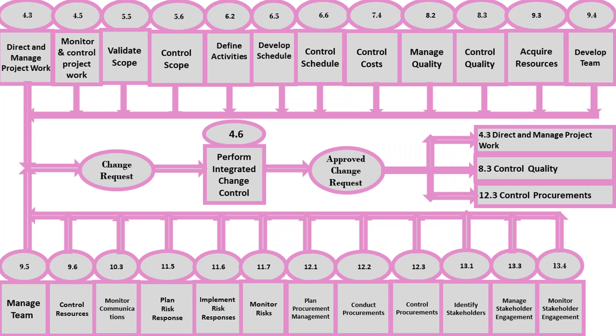Approved Change Requests may be a corrective action, a preventative action, or a defect repair. Once change requests are approved, they are implemented through the Direct and Manage Project Work process. Repair is then verified in the Control Quality process, and any modification to the terms and conditions of the contract is implemented if applicable. Approved change requests are scheduled and implemented by the project team and can impact any area of the project or project management plan.